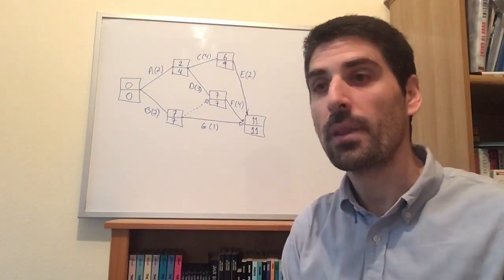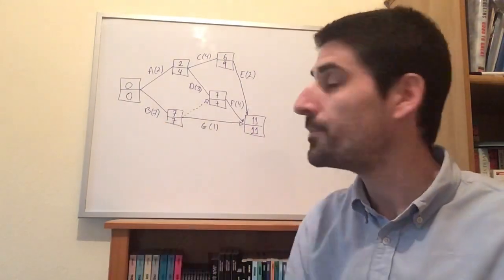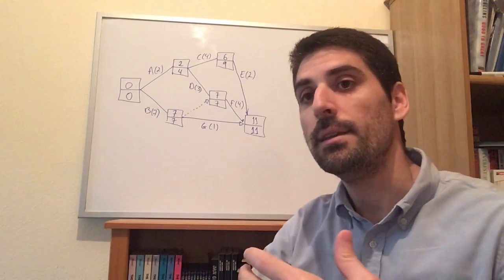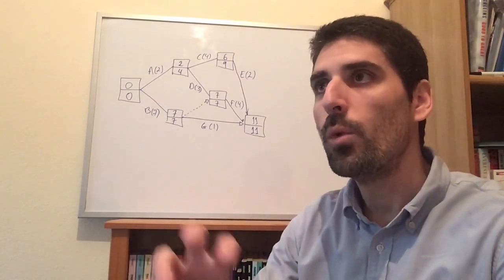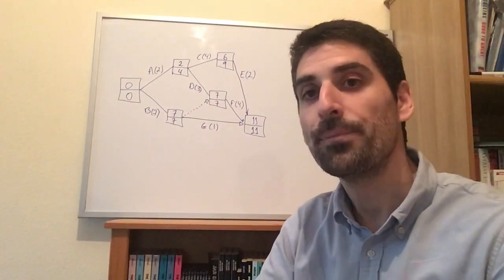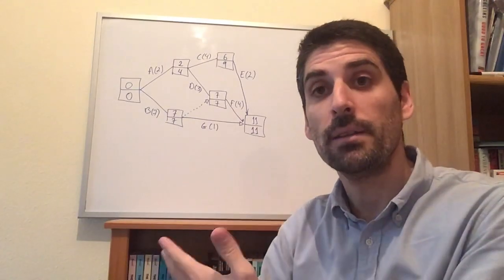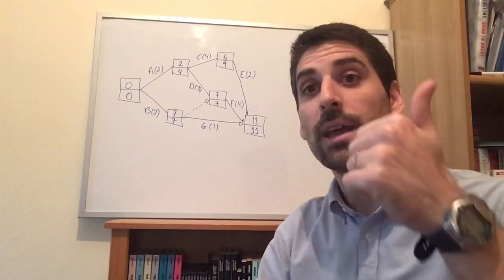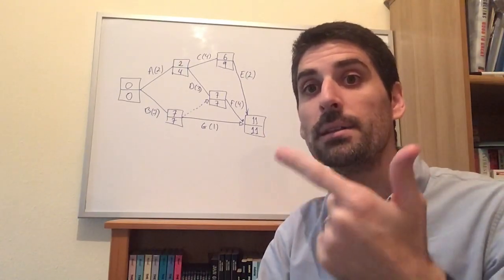And now, here is the next bit of information: identify the critical path. Which activities are non-critical and which are the critical activities? The critical activities are very easily identified from the activity network diagram because they have the same early event time and the same late event time.